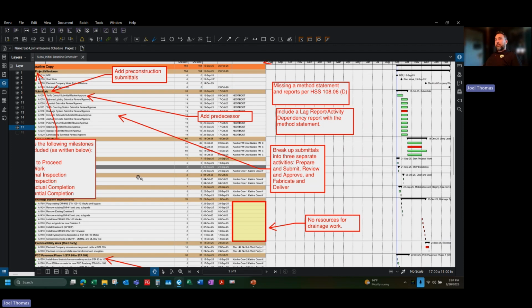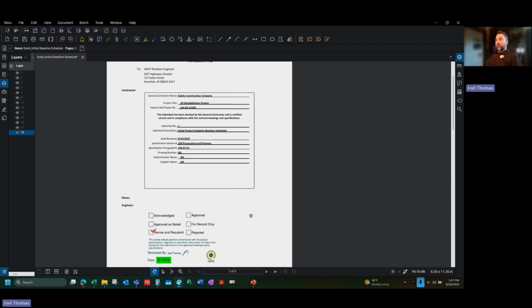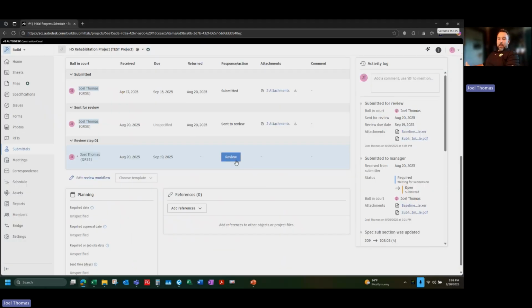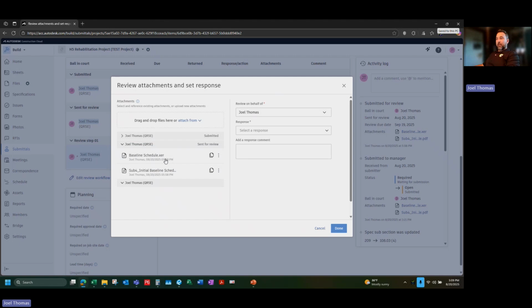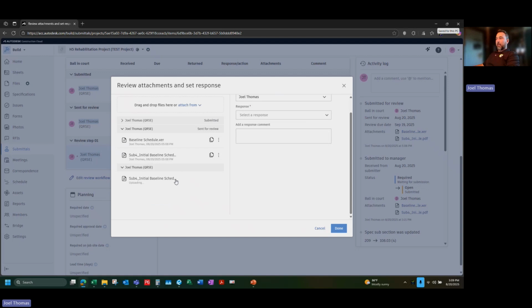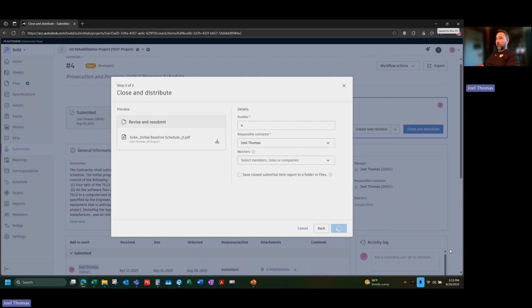Okay, so now we've finished our review. We have a lot of comments. We're going to add our disposition. Now that we've completed our review, what we're going to do is go back in through ACC. I'm going to click on my review icon here and put in my version that I just saved with all my comments. I'm going to call this revise and resubmit, and I'll just say see attached. So we're going to send this all the way back to the contractor.